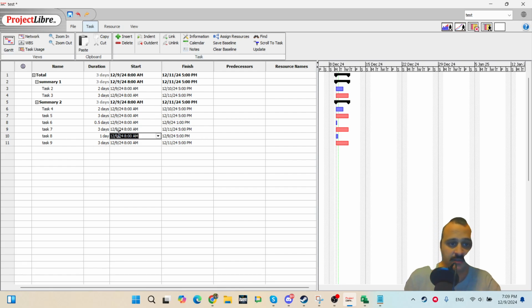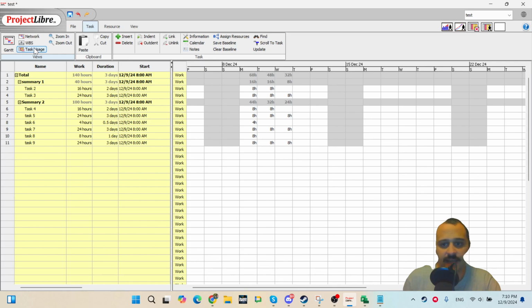Let me double check to make sure. For this one I put 1 e-day, and it converted to 3 days. So if I want to see how exactly, here as you can see it considered 8 hours per day. So I can say that if they had the idea to implement e-days the same as Microsoft Project, they got it very wrong.